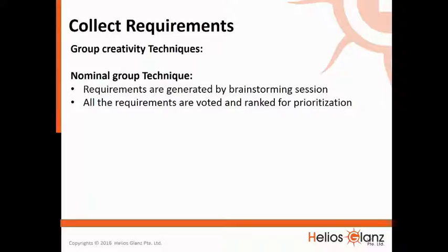Nominal group technique. Requirements are generated by a brainstorming session. All the requirements are voted and ranked for prioritization.